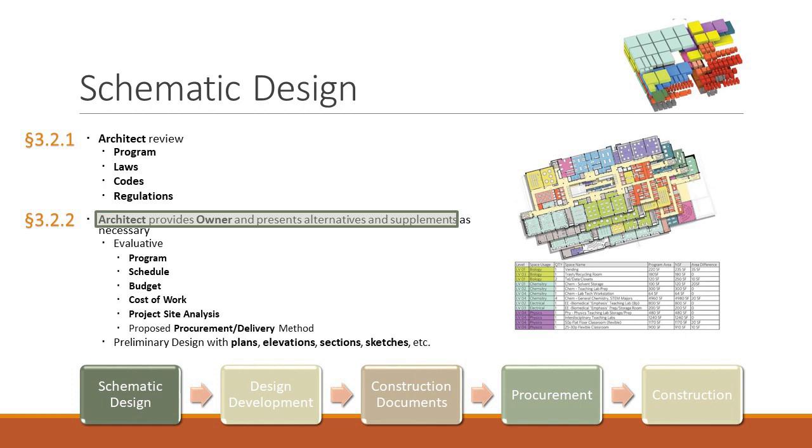And then you're going to provide that preliminary evaluation, and the parties are going to reach an understanding. You're going to say, okay, maybe it's now an $11 million toy factory. Maybe we can't get it done in 16 months, we're going to do it in 21 months. Maybe we need to tweak this or tweak that. And that happens organically throughout the whole project, but this is in the preliminary investigation and preliminary evaluation, so the parties don't start on the wrong foot and the wrong understanding of what the program is.